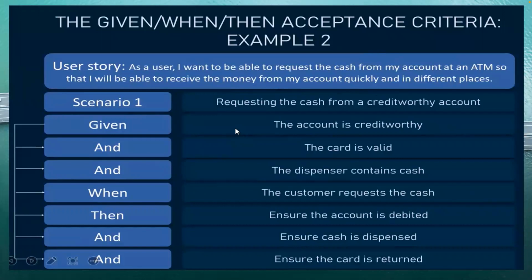So when you're writing your acceptance criteria, you need to ensure that the QA can actually pick it up and test it, and at the end of the day, they can say, okay, yes, it actually meets what we want to achieve on this user story. Same thing with the developers. The developers can go through your acceptance criteria and say, oh no, this is too much, or no, we can't do this together, you have to create a separate issue or ticket for this. And like I said, the main thing is, in most cases, you usually have more than one acceptance criteria.